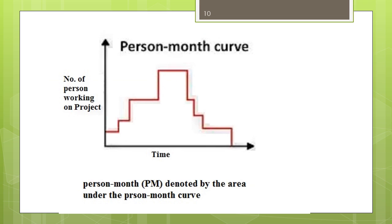The effort estimation is expressed in units of person-months. It is the area under the person-month plot. It should be carefully noted that an effort of 100 PM does not imply that 100 persons should work for 1 month, nor does it imply that 1 person should be employed for 100 months — it denotes the area under the person-month curve.